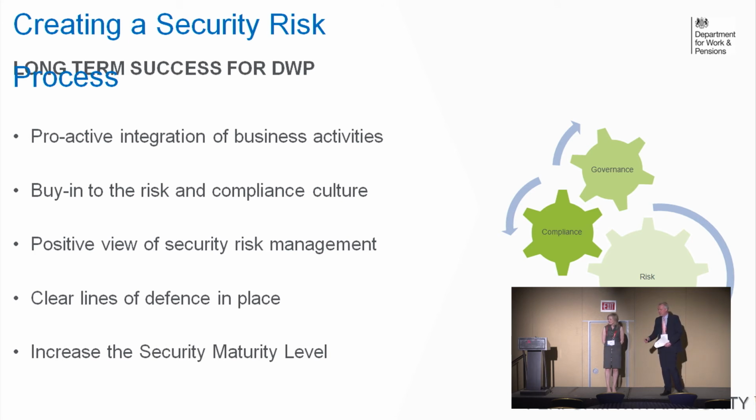Well, probably just that our initial challenges were around the capability, certainly with processes and procedures, and it comes back to what's on the slide here: if we did it the other way around and matured our processes and procedures and then looked at the software. But we bought the software first and then started to mature procedures. We didn't have the expertise, so we employed a transition partner and actually quite quickly found out that they didn't have much more expertise than what we had. So that was a real lesson learned for us. And then as we start to build up the onboarding of the risks onto the tool, we've had further challenges there.